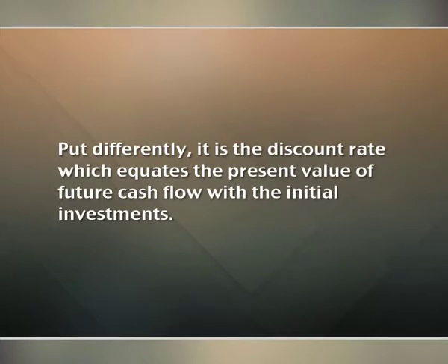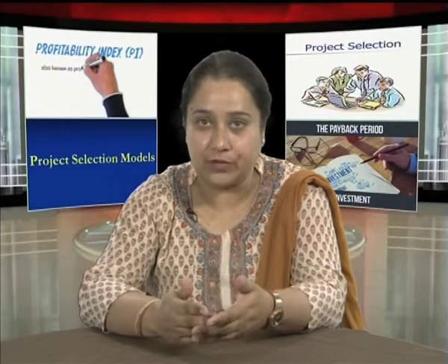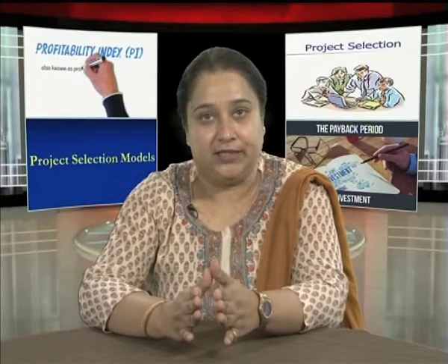The internal rate of return of a project is the discount rate which makes its NPV equal to 0. Put differently, it is the discount rate which equates the present value of future cash flows with the initial investment. If we have a set of expected cash inflows and cash outflows, the internal rate of return is the discount rate that equates the present values of the two sets of flows.